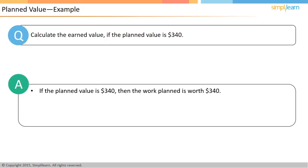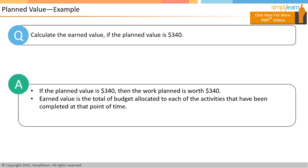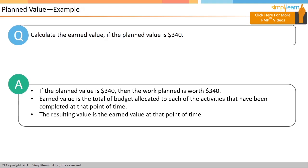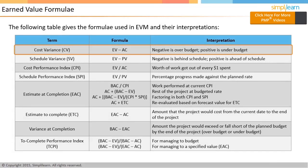To calculate earned value, add the budget allocated to each of the activities that have been completed at that point in time — the resulting value is the earned value. In cost variance, a negative value means the project is over budget, while a positive value means the project is under budget.